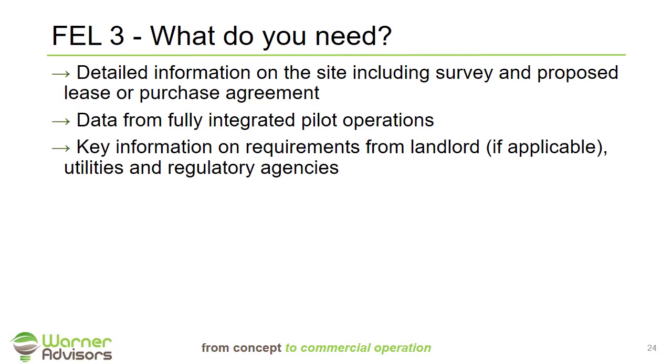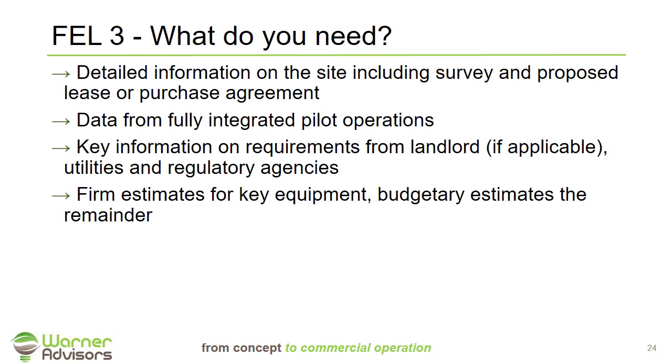You're also going to need key information from the landlord on utilities and regulatory agencies to make sure all the utilities, power, natural gas, water, things you're going to need to run your process, that those are there in reasonable supply and that the process you're looking to build can make it through the regulatory hurdles.